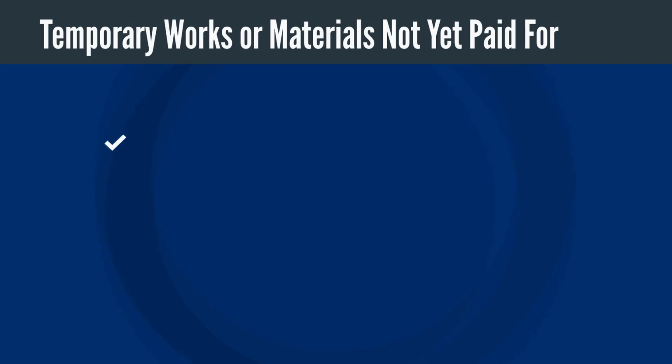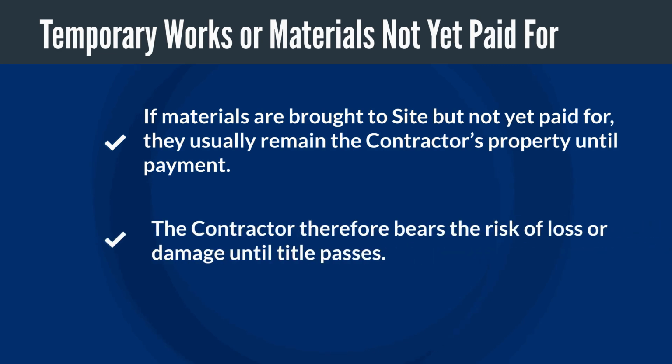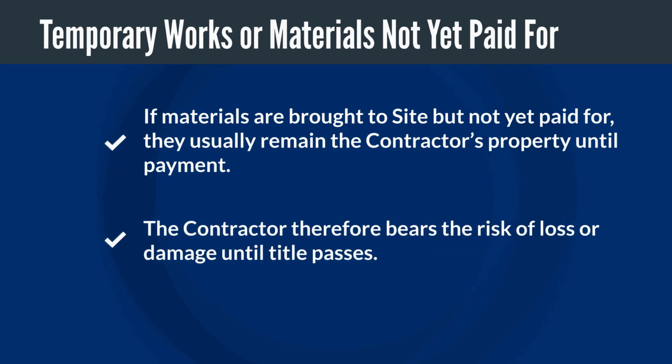Temporary works or materials not yet paid for. If materials are brought to site but not yet paid for, they usually remain the contractor's property until payment. The contractor therefore bears the risk of loss or damage until title passes.